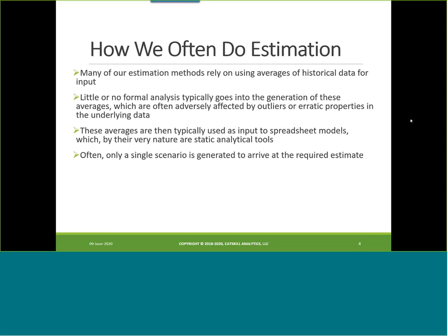We often only generate a single scenario to arrive at the required estimate. I see this a lot as well when I work with folks. They've got a spreadsheet, maybe an elaborate spreadsheet, lots of inputs, lots of formulas, lots of cells, and one answer at the bottom. Well, there's almost no chance that that answer is going to be the exact answer that comes out in real life.